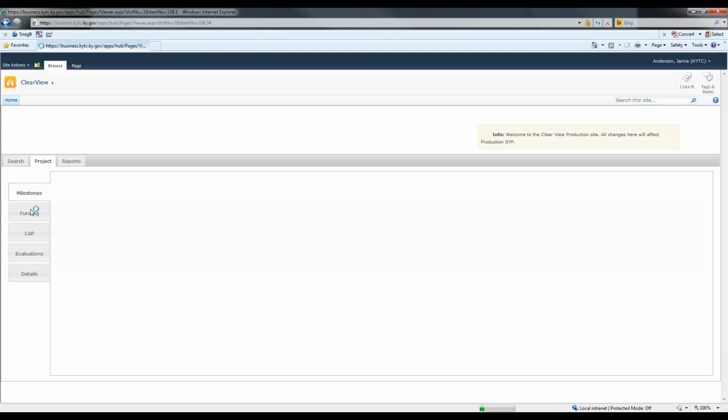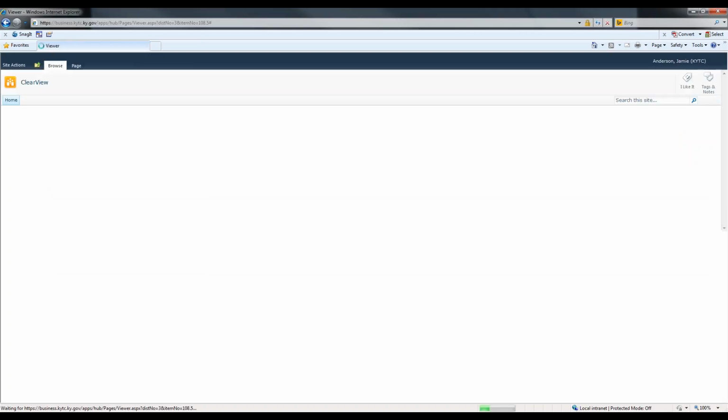The next tab is the Funding tab. The Funding tab is used to view project funding status and to update current cost estimates. So if your project recently held a PL&G or a joint inspection meeting, this means that your estimates need to be updated, and this is the screen that you will use for these updates. On the Funding tab, there are two tables. The Authorized Funds table will list all phases, funding codes, authorization dates, and authorized amount. If a phase is not authorized, it will be listed in this table, but will have no authorization date, and the authorized amount will be 0.